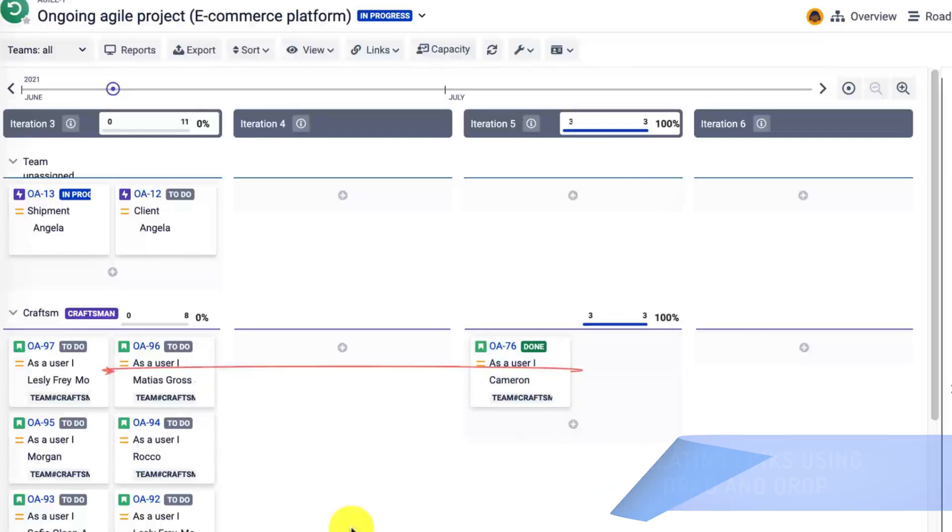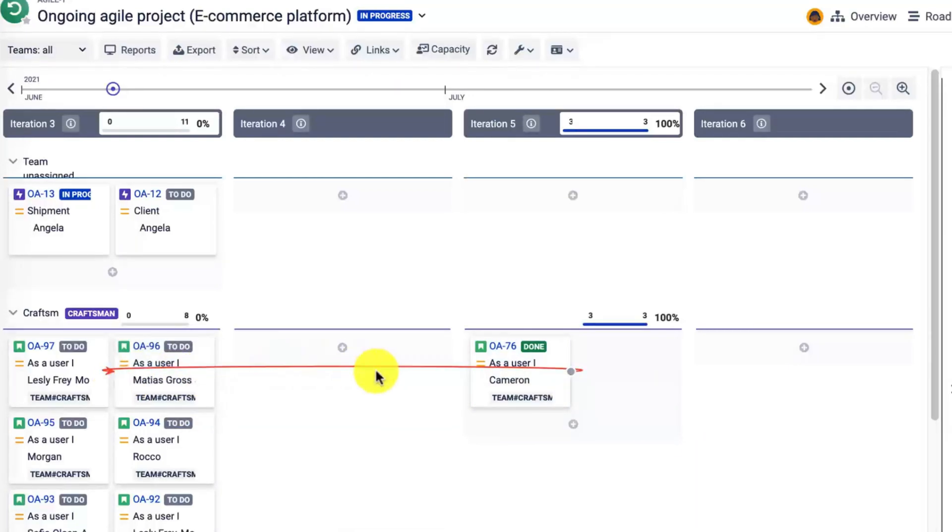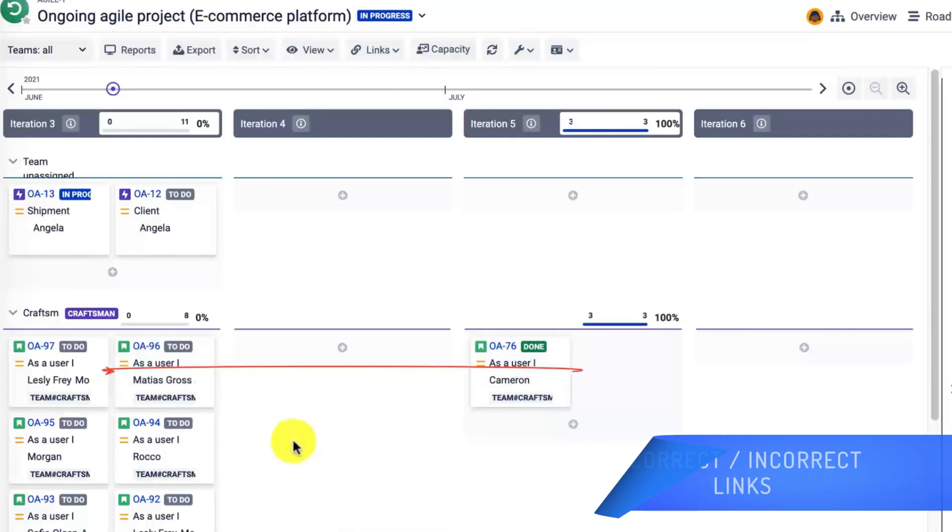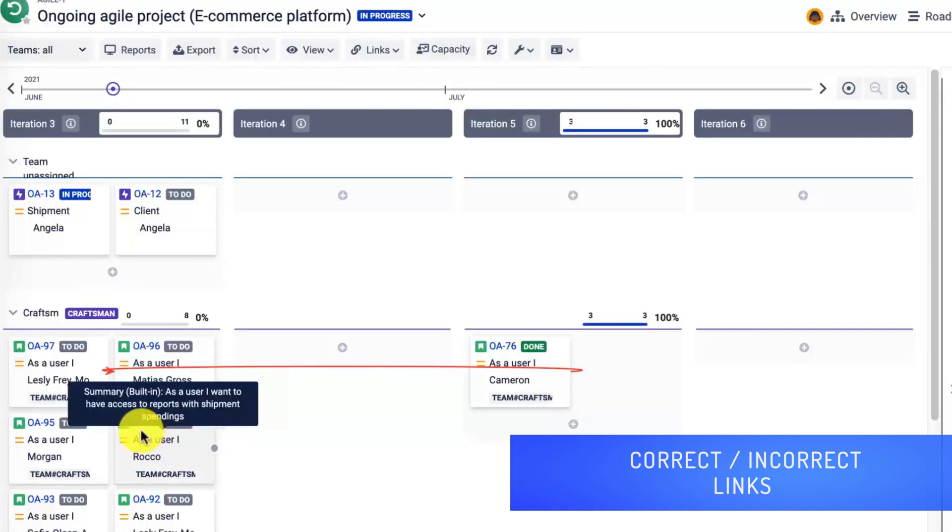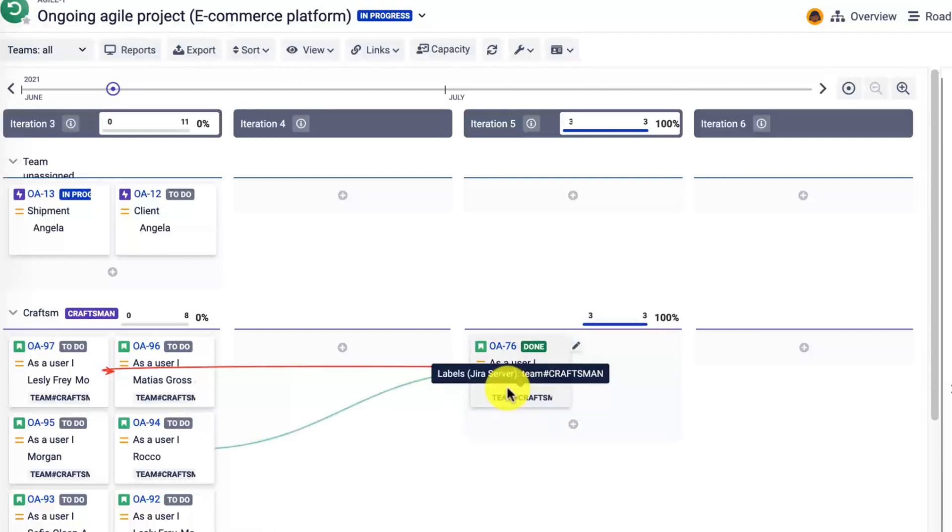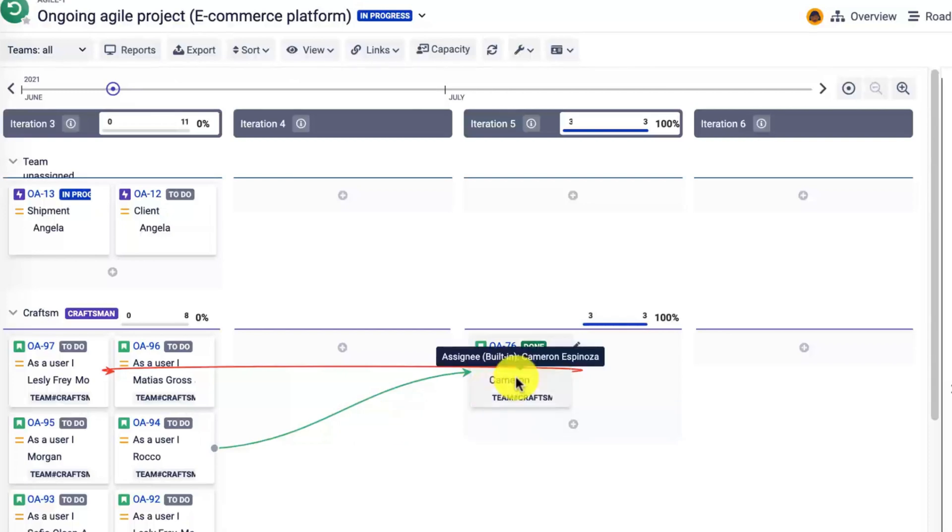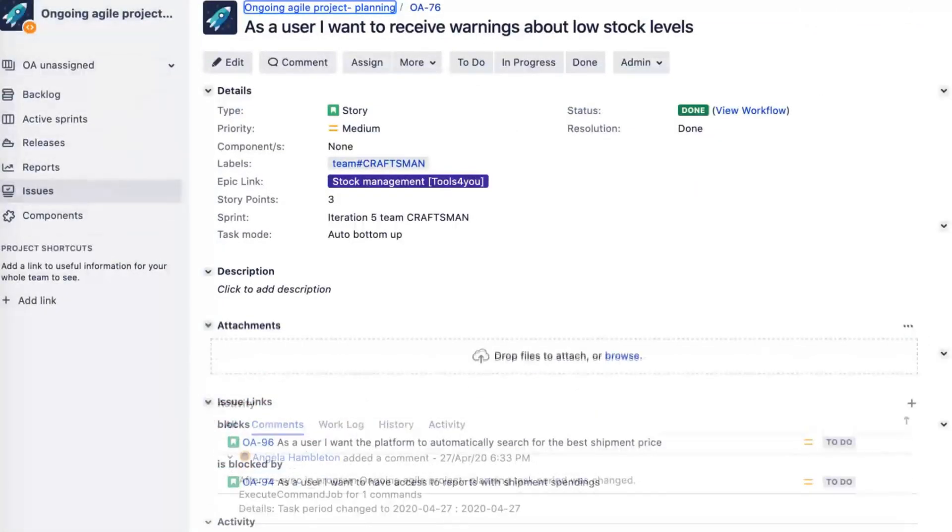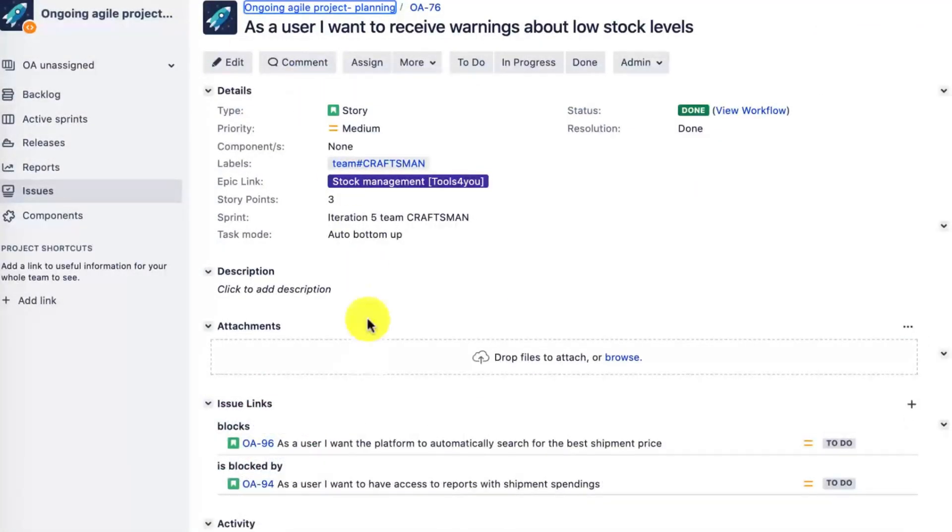Let's create such a dependency and visualize it using BigPicture. I need to drag and drop the dependency, and as you can see, the link turned out red. I'm using the blocks link. The red link shows me that the sequence is incorrect. If I drag and drop the OA94 and connect it with the other tasks, you'll see that the link is displayed in green, which indicates that the dependency is correct.